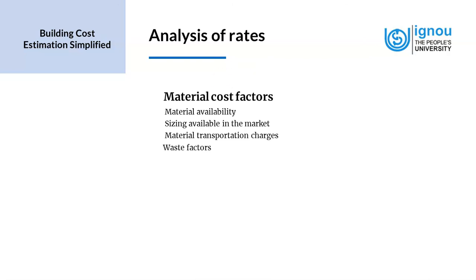Waste factors will also have an implication on the material, and also bear in mind that the impact would not be on the labor cost, because irrespective of the quantity of material that we purchase, the labor cost is always calculated based on the actual quantity of work that is executed.